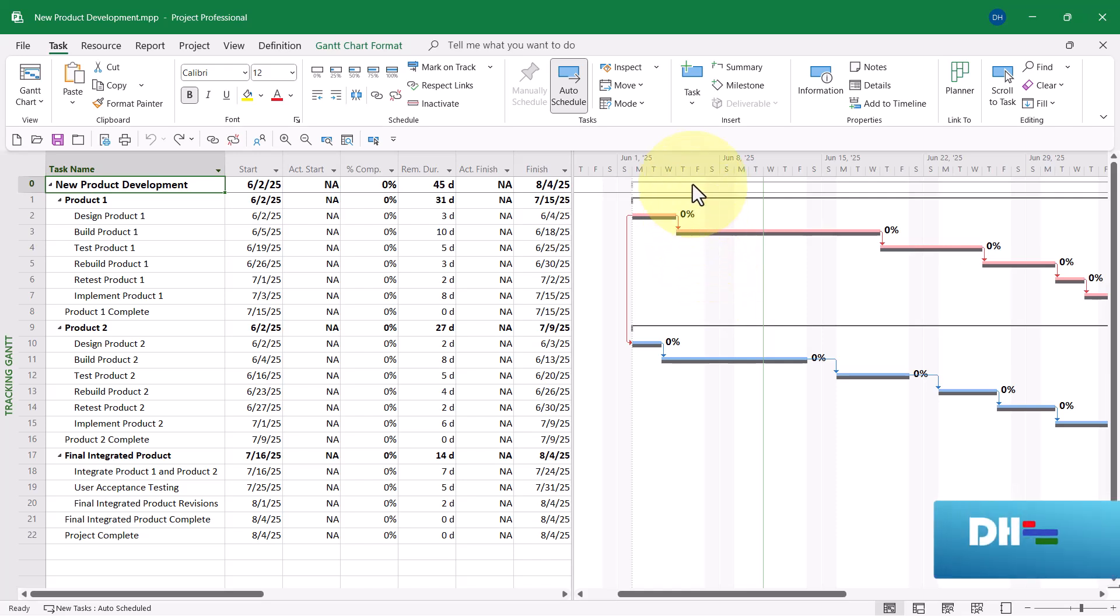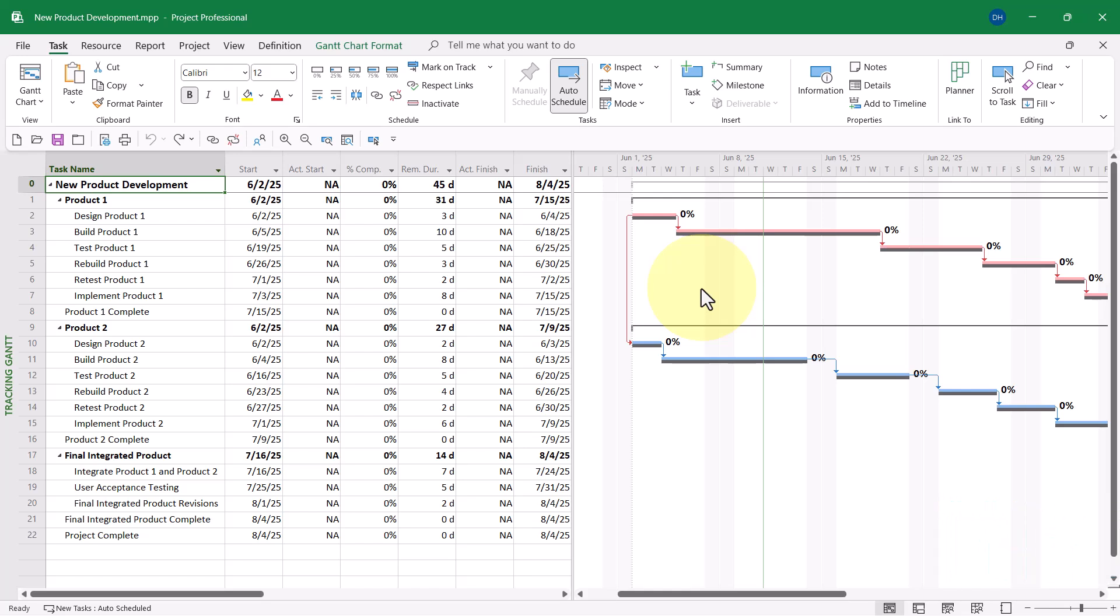For the purposes of this demo, I'm going to select Friday, June the 6th, as the last day of last week's reporting period. That is the date by which all progress should be current in this project.